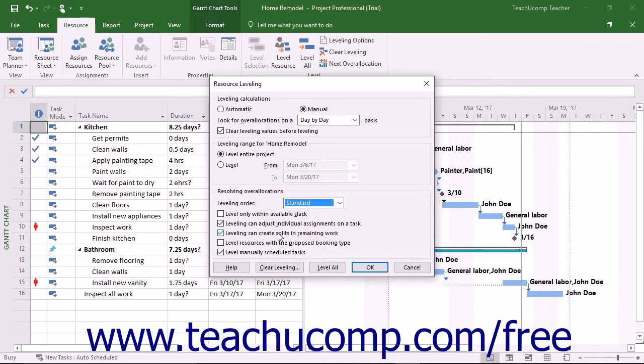If you are using Microsoft Project Professional, you may also see a Level Resources with the proposed Booking Type checkbox. You will most often leave this checkbox cleared when leveling resources.